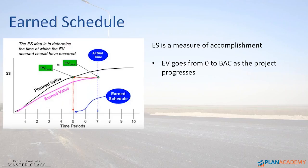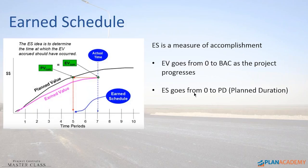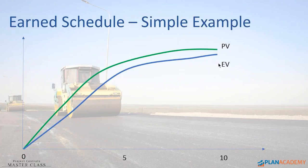Here's how Earned Schedule works. This is from Walter Lipke's slides. The main idea is to determine the time at which earned value accrued should have occurred. In equations, it means: where did PV equal EV? It's looking a bit complex, but we'll work through it on the next slide.